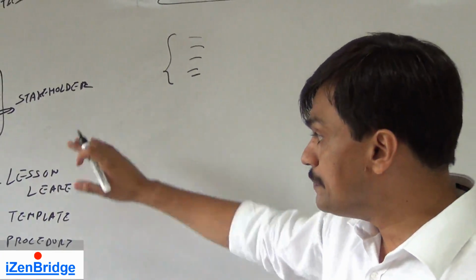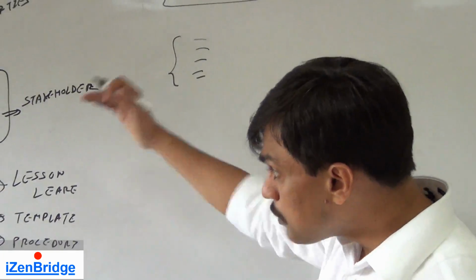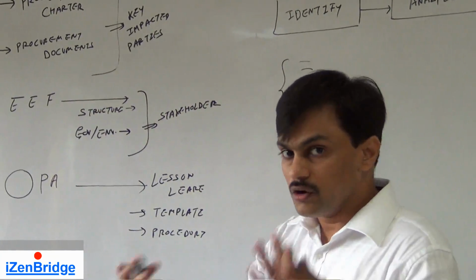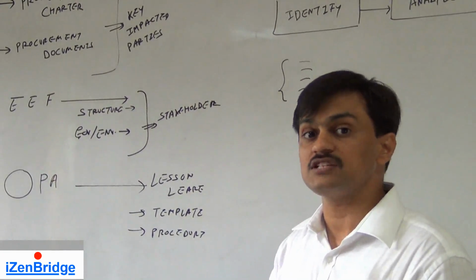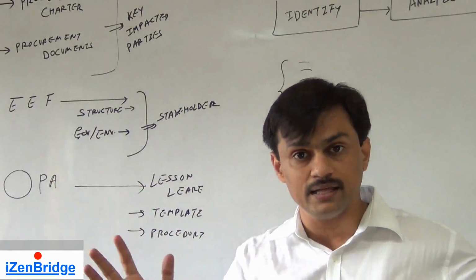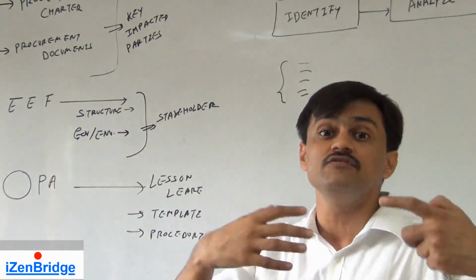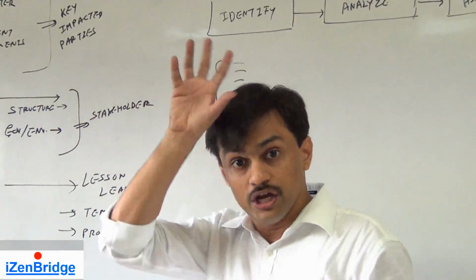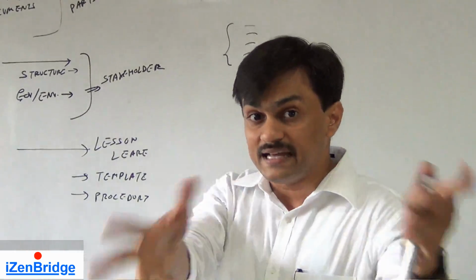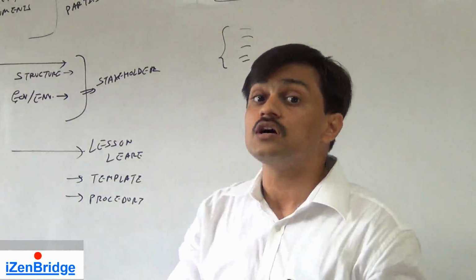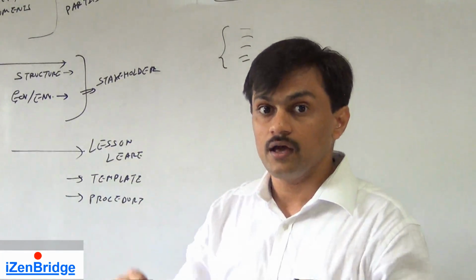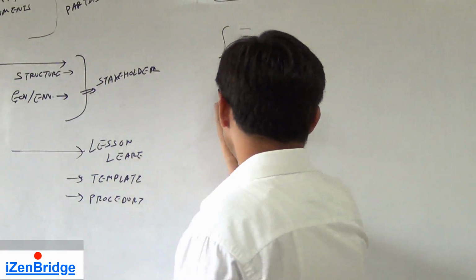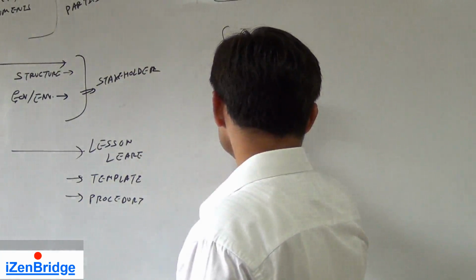We may involve people who were responsible for executing the procurement deal. Like, I am in a project, I am just a project manager, but there was a big history. There was a pre-sale event, there was a bid process, our pre-sale team was meeting the buyers, and they made some promises. There were a few individuals who were playing a very key role in getting this contract done. So I need to consult all these experts and take their help to identify them. So the second tool which we use is expert judgment.